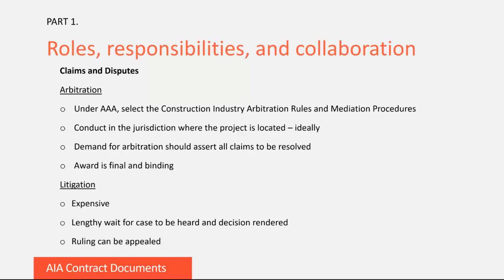The other option for binding dispute resolution is litigation in the courts. Of the three options, mediation, arbitration, and litigation, this is the most expensive and will take the longest amount of time to receive a final decision. However, it does afford you the option of appealing a ruling.